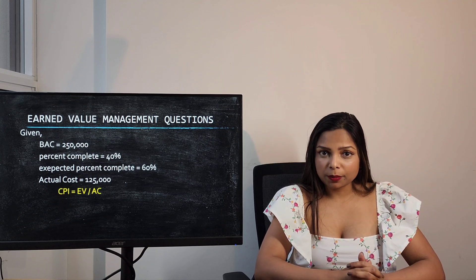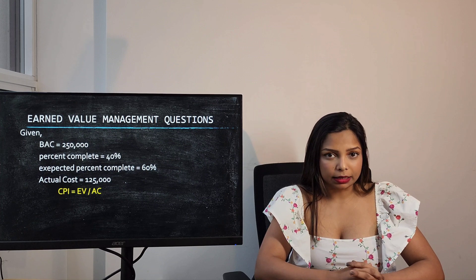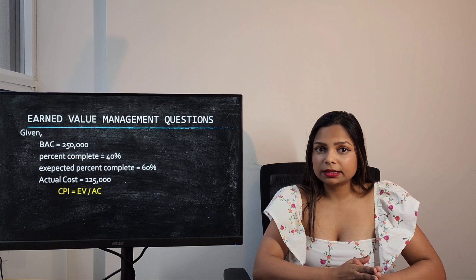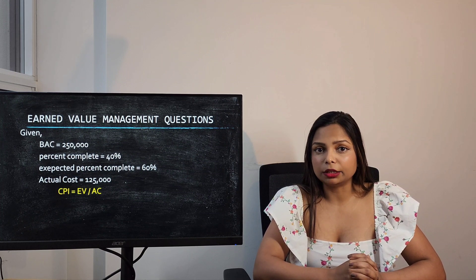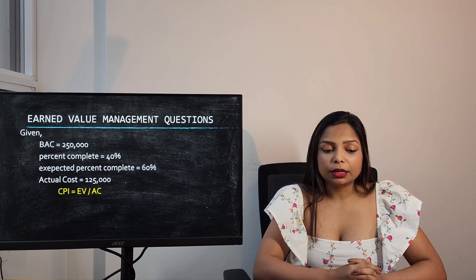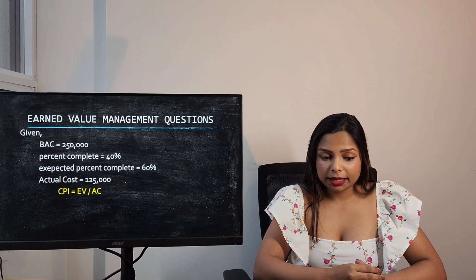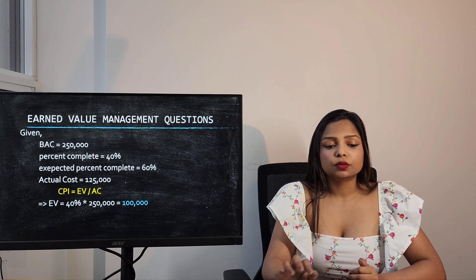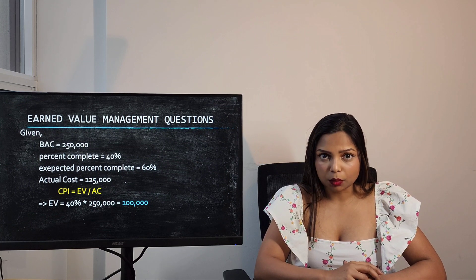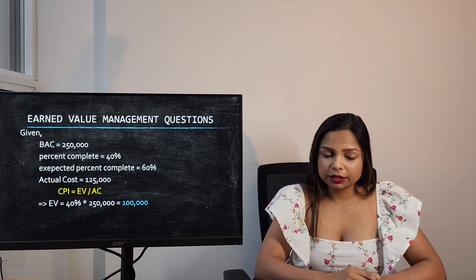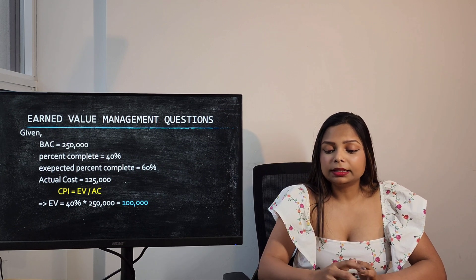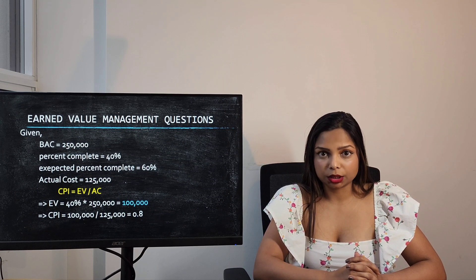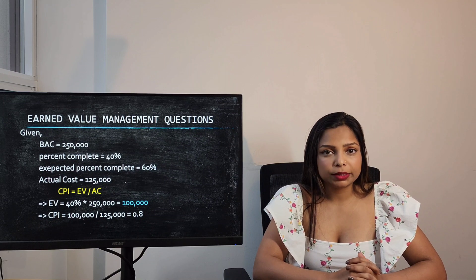To calculate the Cost Performance Index, the formula is Earned Value divided by Actual Cost. First, calculate Earned Value: 40% multiplied by $250,000 equals $100,000. Then divide $100,000 by $125,000, which gives a CPI of 0.8.